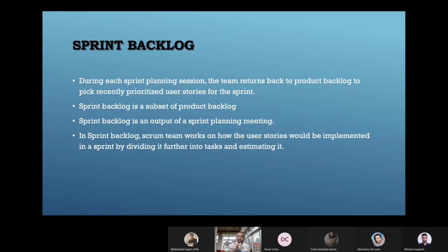If you have one story and you are doing story pointing, it's difficult to estimate. But if your story is broken down into 7 tasks which need to be completed, you will have clear visibility. Okay, this task is going to take this much time, this much effort, this much energy, with some unknowns and knowns, so we can do the story pointing. That is how we'll do it.